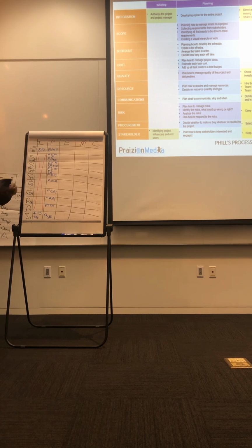All right, so page 126. Where would you put your acceptance criteria? Would that be in scope? Exactly, so it's going to be right here. In collect requirements, you want the acceptance criteria. There's a document I showed you yesterday, the requirements traceability matrix. You want to make sure that you begin asking, okay, what's the acceptance criteria for this requirement?